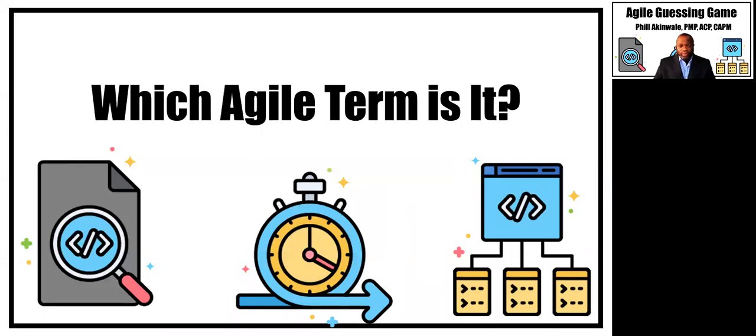What will you do before our next stand-up meeting to move us closer to the sprint goal? And which impediments are getting in your way? The Agile Alliance defines these as, what have you completed? What will you do next? What is getting in your way?